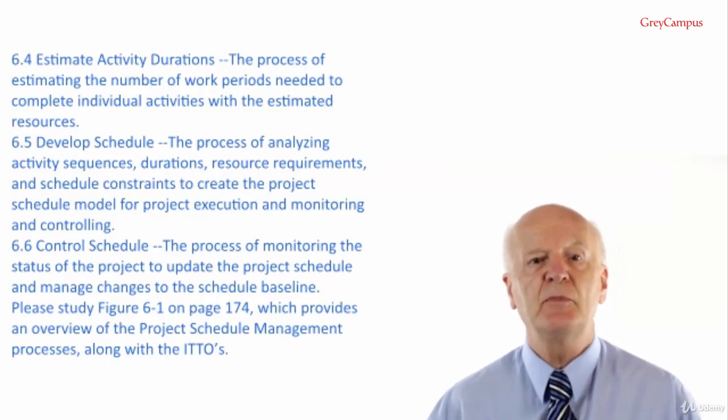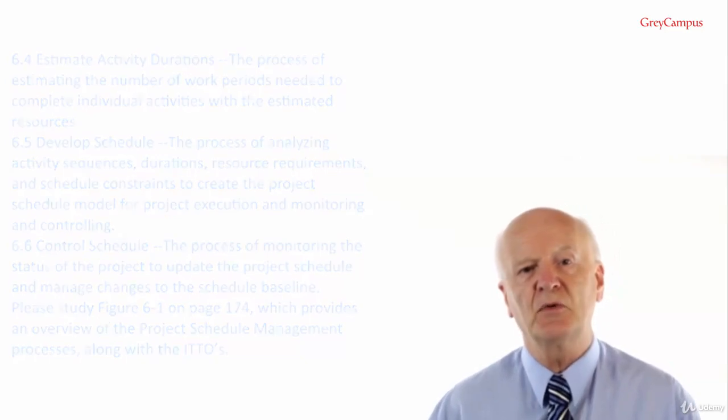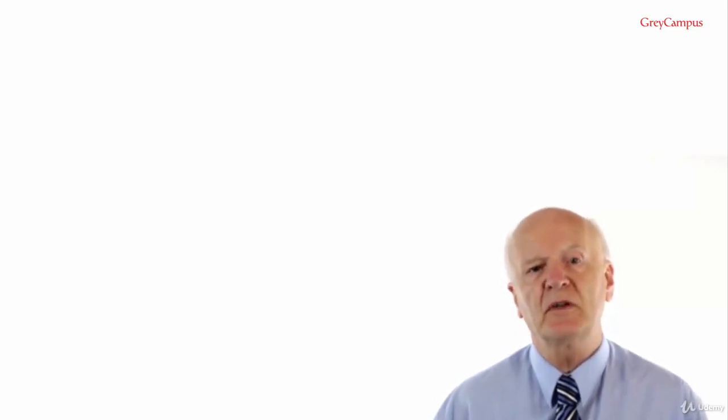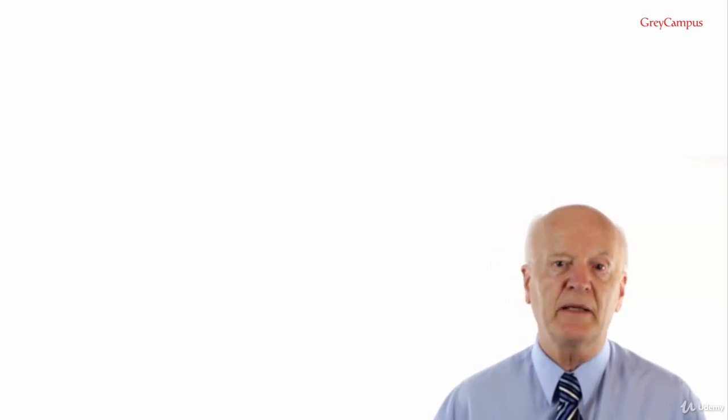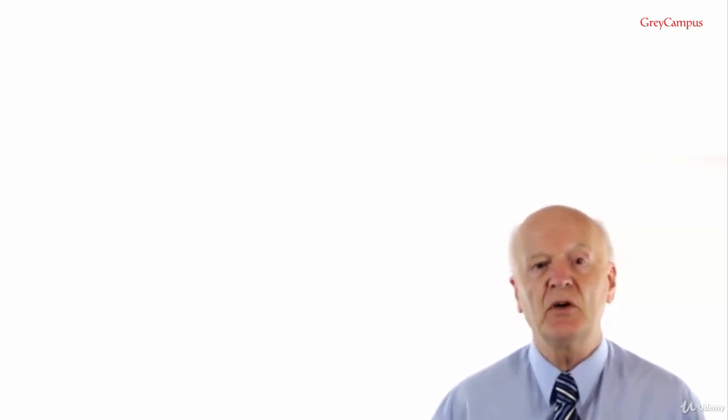Key concepts for project schedule management. One of the key sections of the previous module, Project Scope Management, was to create the Work Breakdown Structure and Work Breakdown Structure Dictionary. And the main deliverables of the Work Breakdown Structure were decomposed down to work packages. And we learned that work in a work package, and indeed in the Work Breakdown Structure, is talking about deliverables, not activities. The Work Breakdown Structure is entirely deliverable based, and so all the entries on the chart are nouns.